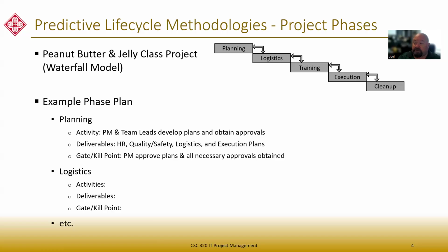Specifically, what are the phases? Well, I think this should be a planning phase, a logistics phase where we gather up the material, a training phase where we make sure that everybody knows how to make and sell sandwiches, an execution phase where we actually do the work, and then a cleanup phase that cleans up everything and does account reconciliation and whatnot. And so that's what my project looks like. So there's my life cycle methodology, and I would be able to describe that. In section 3, where I write what is my management approach, here it is. There's my life cycle methodology.